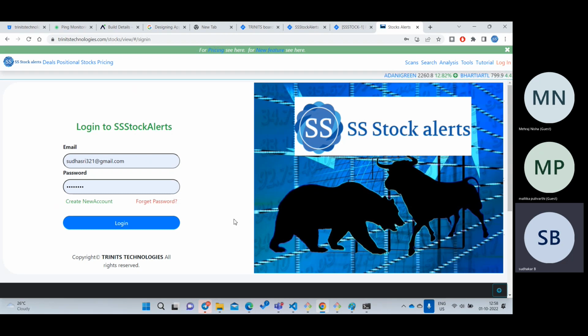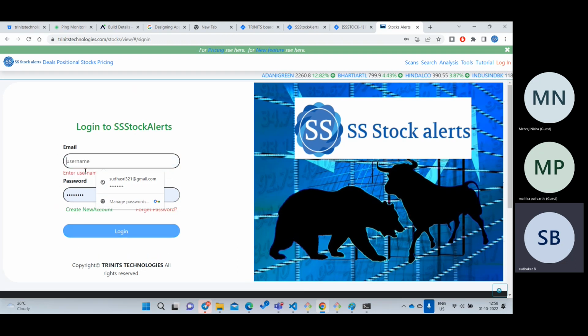First, you develop the screen. You say 1 day for the screen, so I am going to implement it in 1 day. And again, you need validation, right? If I don't enter any details and click, validations should appear. You add the validation and take some half day. So 1.5 days is done. Now you need to integrate with the back end. You need to write some service, back end code and all these things. For that you take another 2 days. Now how many days? About 4 days.